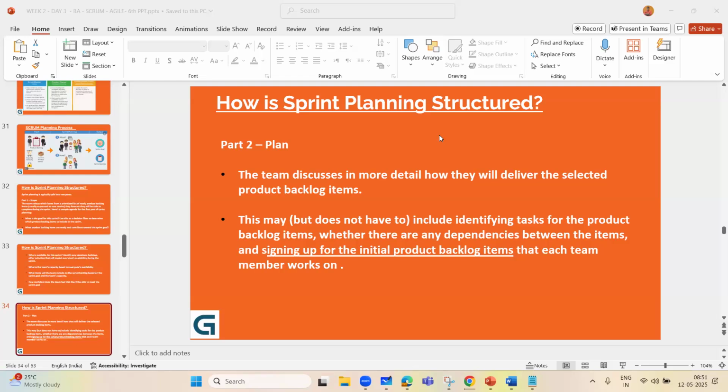Account number will be associated with some person, right? It means that person is the dependency, so the existence of the person should be there. Otherwise, who will transfer to whom? Before fund transfer comes into the picture, client registration is required and a client account is required. Then only can things be operable. So these are the basic dependencies.